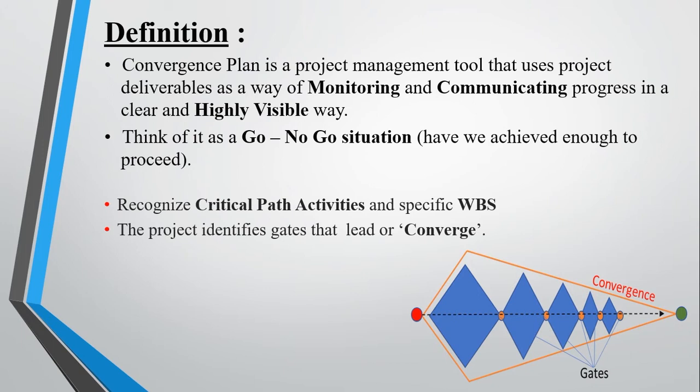Within each gate, deliverables are defined, including deliverable dates and persons responsible. So we talk about getting a gate, we talk about understanding the deliverables in that gate, and we talk about a deliverable delivery date, and we effectively have an actionee to be able to drive that deliverable through. Regular review of the deliverables allows early detection of late delivery and opportunity to recover.